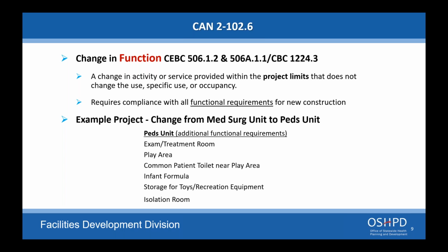A lot of the times with the temporary equipment, it's not known up front how the exact logistics will work, and those are done oftentimes separately during the project. It is not an ACD of the project. It would be a separate permit, but you can include it in the original project. If you know exactly what you're planning on doing, you can include the temporary work within the original permit.